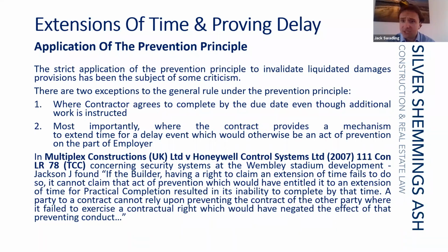And you would see in the JCT form where it lists relevant events, that the provisions granting the right of a contractor to seek an extension of time are drafted in quite broad terms, just for the very reason that unless it is, then it risks that certain actions of the employer might fall between the gaps and potentially lead to difficult arguments about whether or not time has been put at large.